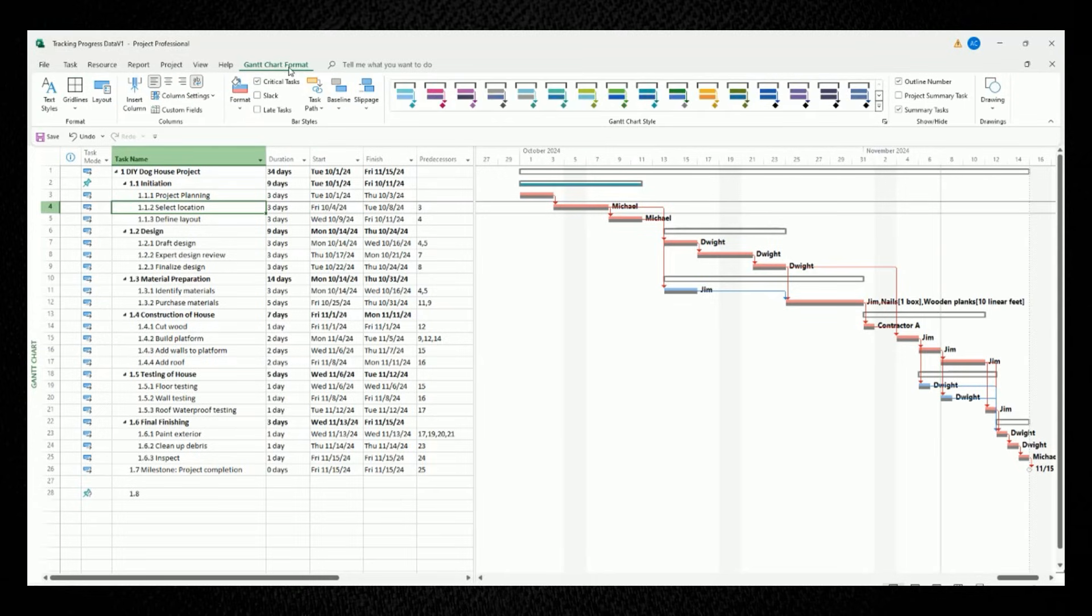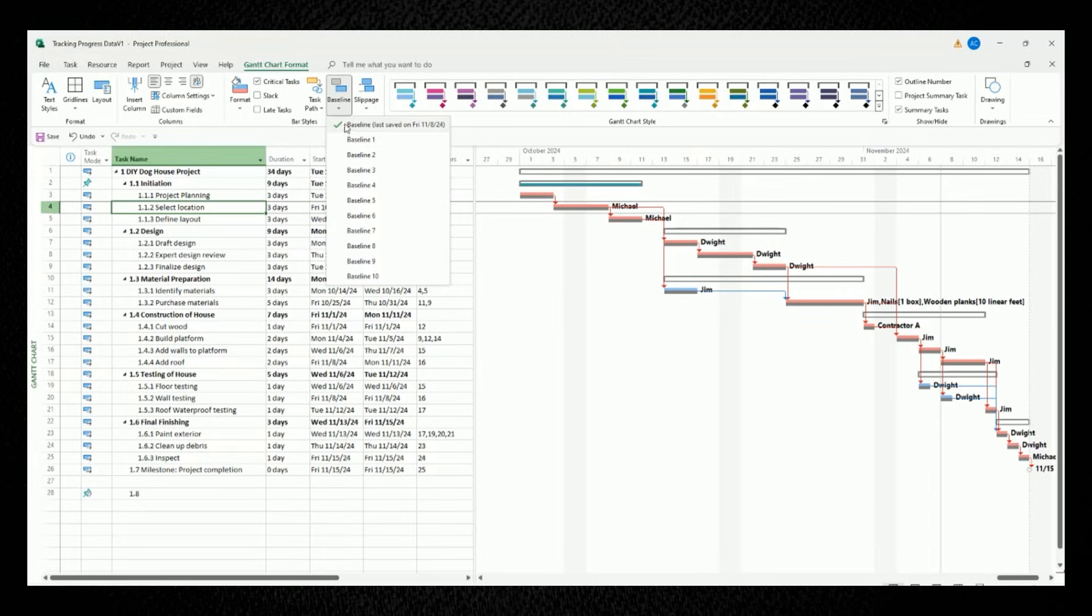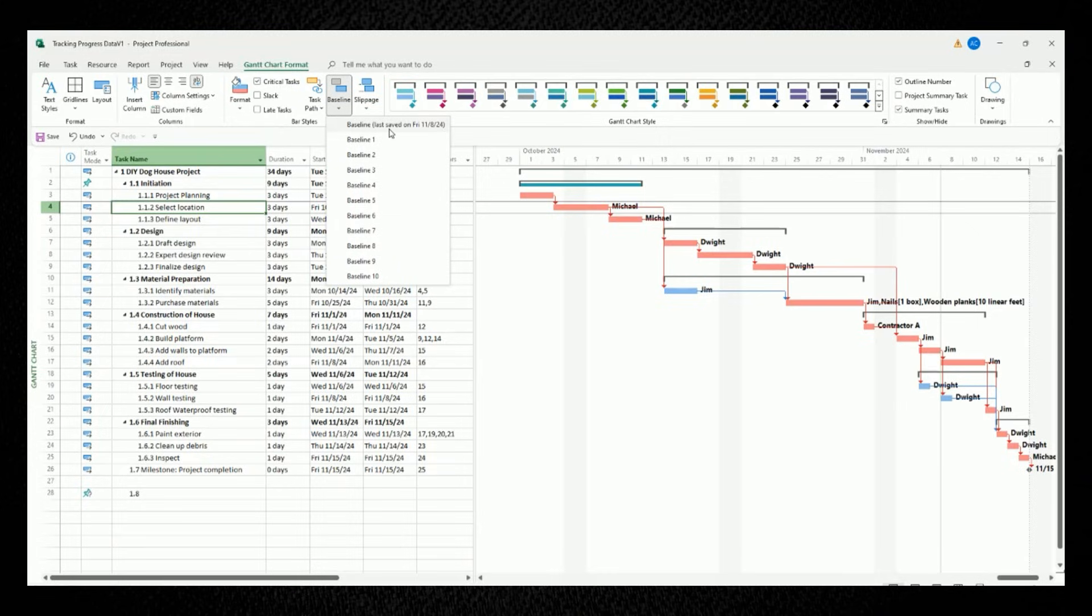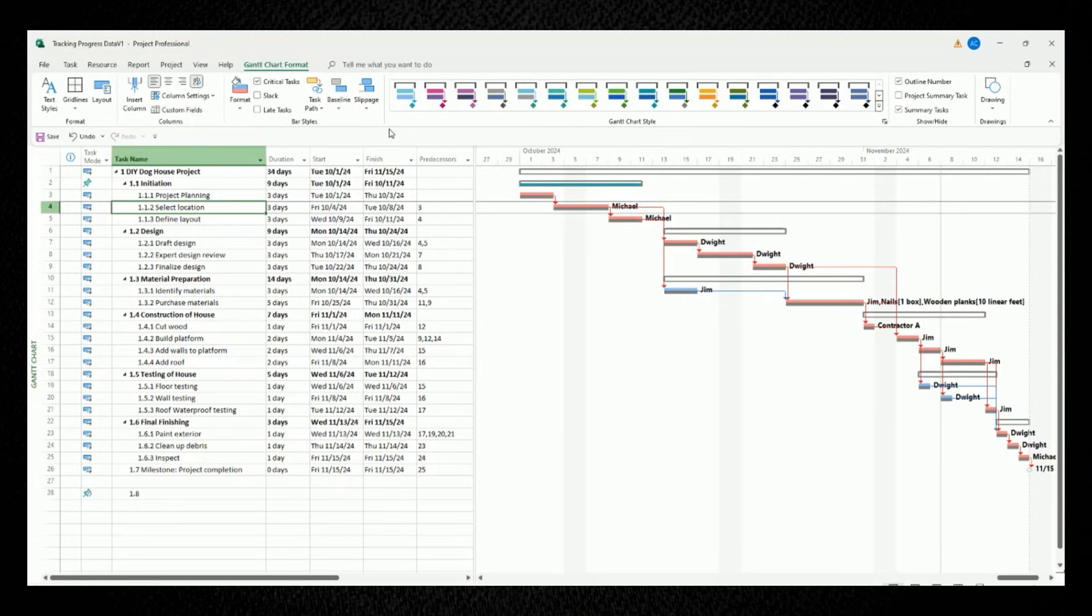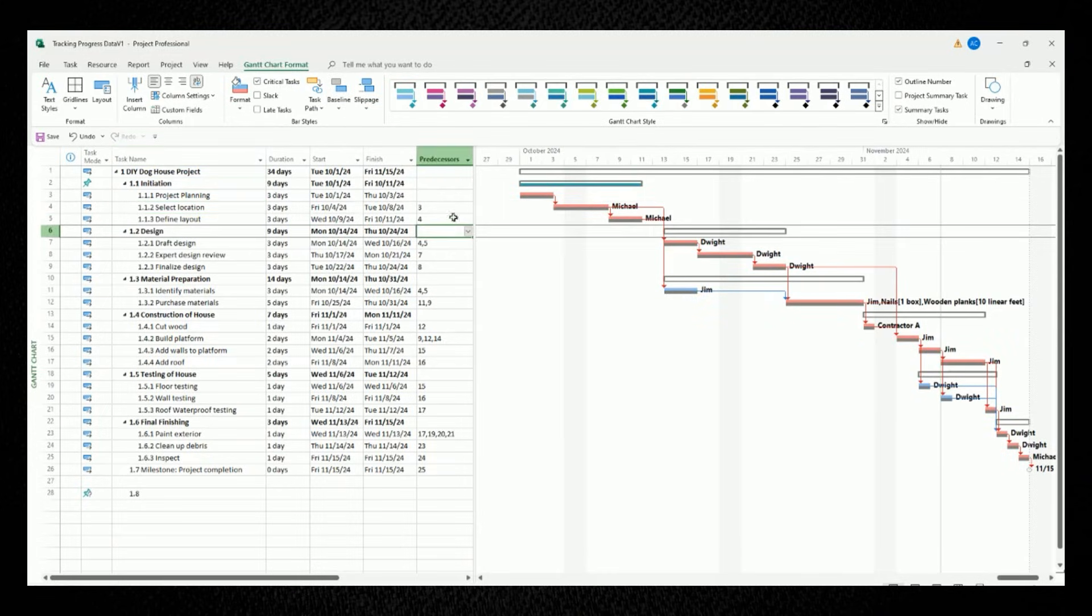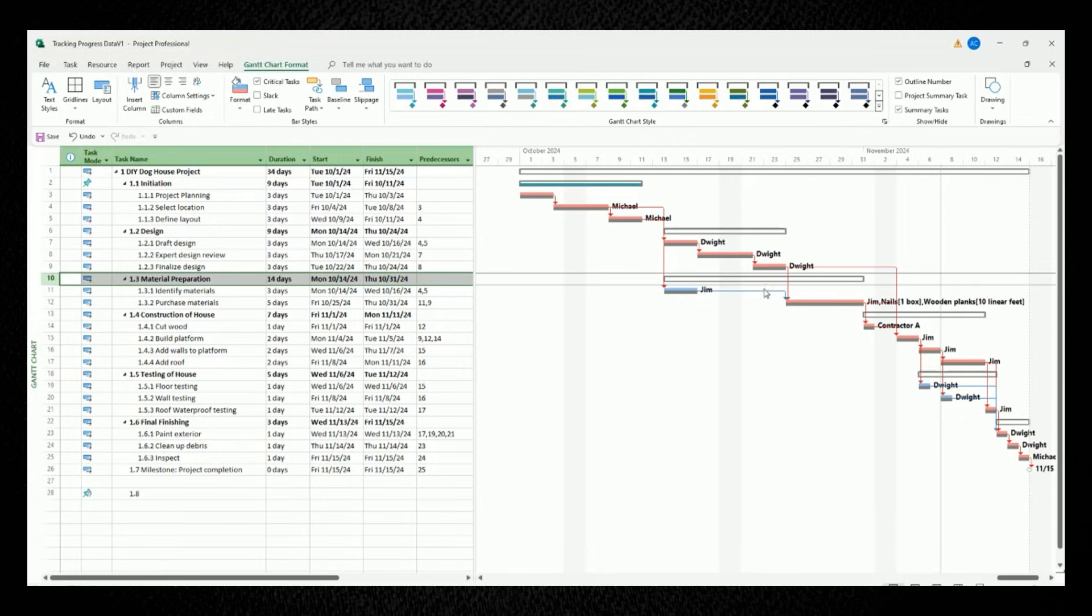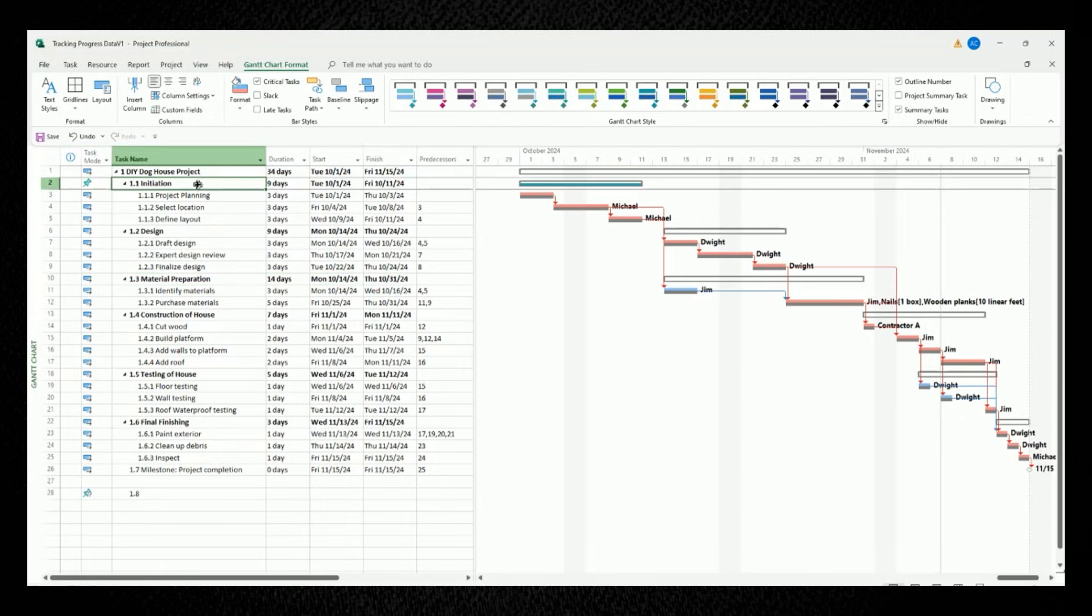So to make sure that your baseline was created, move your mouse button to the Gantt chart format tab. Then select the button for baseline, and in that drop-down, you can see the most latest baseline that you just created. Now mine says baseline last saved on this date. So when I click on this baseline in the Gantt chart to the right-hand side of the screen, you'll see a dark grayish bar appear underneath each of the red and blue task bars. These dark grayish bars represent the schedule baseline that you just created.